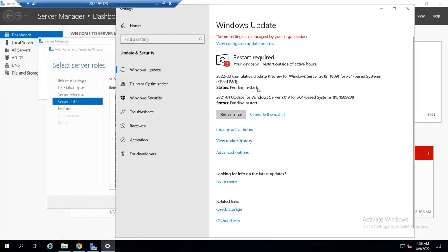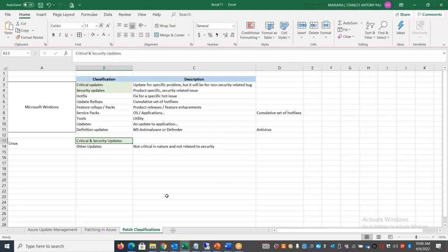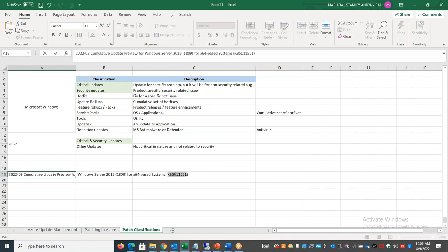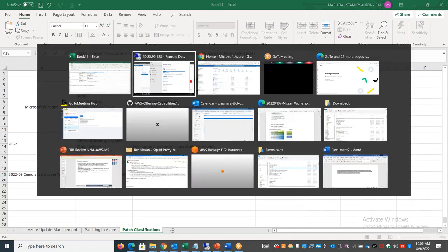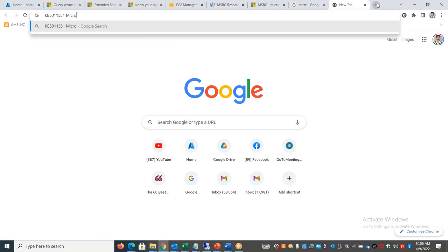For example, for my system, I have to check with the application owner that there is a cumulative update, and whether we are good to update with this KB article, or whether there is any issue with installing it on my system. This is the role of the client security orchestrator or cloud security orchestrator. They say this is what we are planning to apply, and ask whether any specific challenges are related to it. That decision has to be taken, and then we apply it.